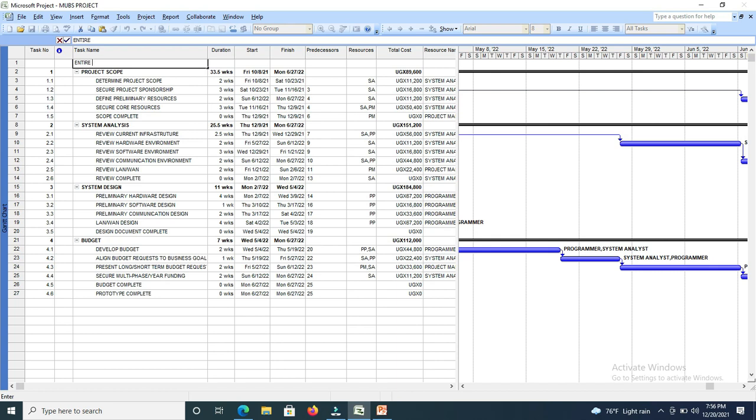That means all the total cost, total duration are all going to be here. But if this is the entire project, that means all major projects have to be indented inwards so that you're able to show the level. Okay, so I'm going to indent the major tasks.